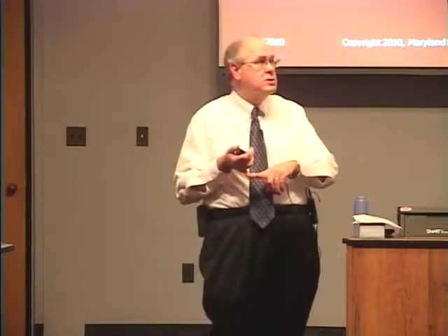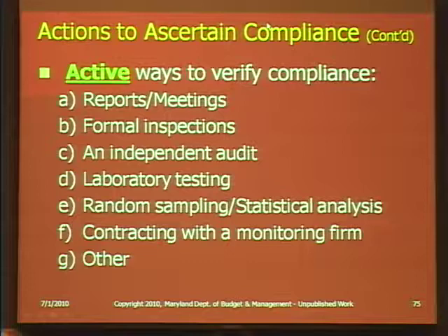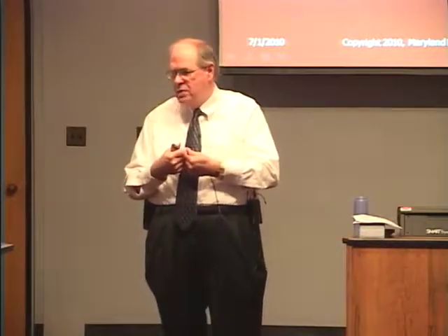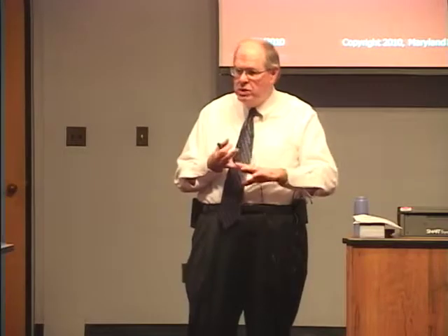So that's an audit situation. Occasionally, depending on whether it's a tangible item, you might have laboratory tests that tell you whether it's being done. You might have sampling, random sampling, statistical sampling that indicates whether performance is happening. You can have an outside firm that is specifically hired to do nothing but oversee a vendor's performance, as Mark has said, because they typically might have more skills, more time, more focused ability to do management than perhaps we in the state.